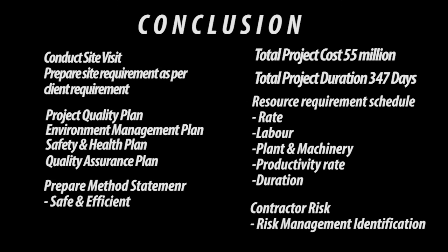Thank you. I've conducted a site visit and prepared a site visit report. We also prepare site requirements as per client requirements, such as providing hoarding, temporary access, site office accommodation, and others. For this project, we also prepare project implementation manuals, such as the project quality plan, environment management plan, safety and health plan, as well as the quality assurance plan. We also prepare a method statement to ensure the work is carried out in a safe and efficient manner.